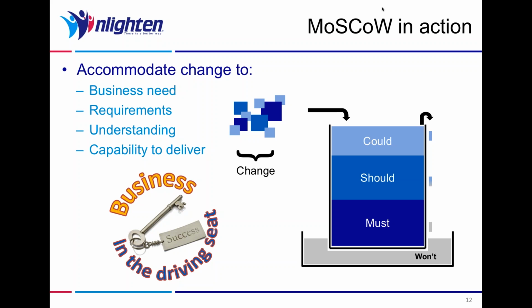Which requirement can we de-scope? In the early days, it's easy. Those requirements are could-haves. We don't really expect to deliver those anyway, certainly not all of them, and they don't have a great deal of value, and there are definitely easy workarounds. So it's an easy conversation.